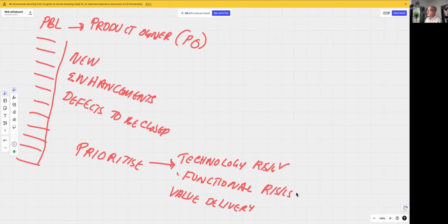Similarly, the key features, if there is no clarity, deliberately we may give it high priority so that they can be developed very early in the earlier sprints, which will result in better risk management. And always we ask this question, what is the value this feature will deliver to the client? So based on these parameters, we keep prioritizing the features.